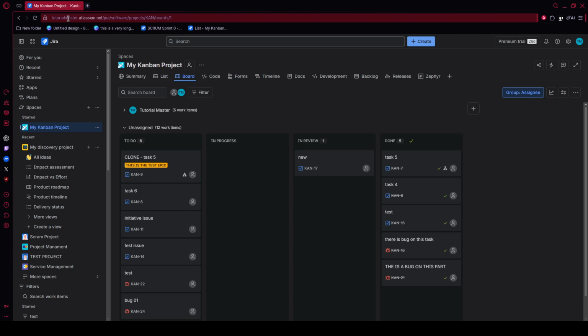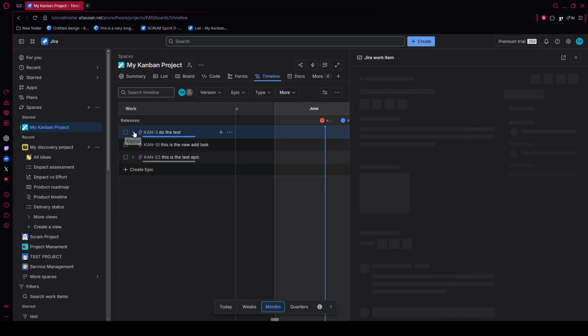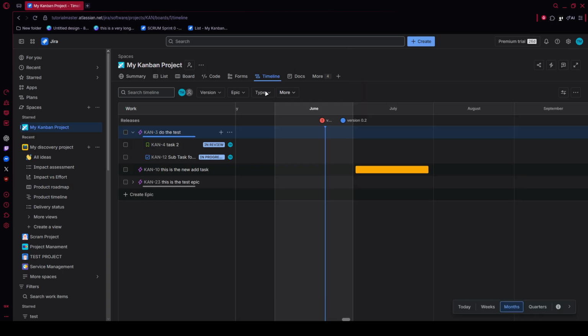After the project loads, look to the navigation menu on the left side of the screen. In that menu, find Timeline. In some Jira setups, this may be labeled Roadmap instead. Click it once to switch from the detailed board view into the higher level planning view. This is where you'll manage bigger delivery windows instead of individual task cards.